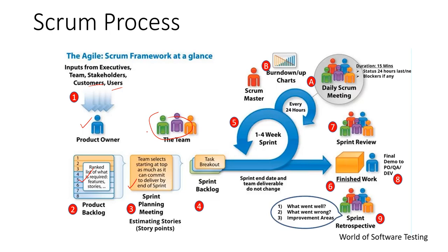The specific requirements will be taken as an input for the particular sprint, and those requirements are documented into the sprint backlog document. Based on those picked stories committed by the team, the sprint backlog document is created.